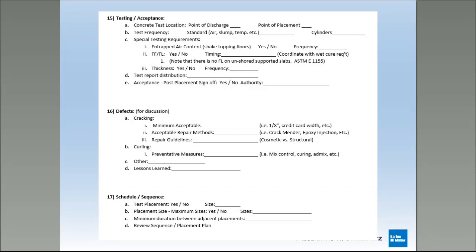You want to have a post-placement sign-off, and who's going to be the authority to sign off on that placement that it's correct? Is it an owner's rep, and are they agreeing to everything we're talking about during this pre-placement meeting?